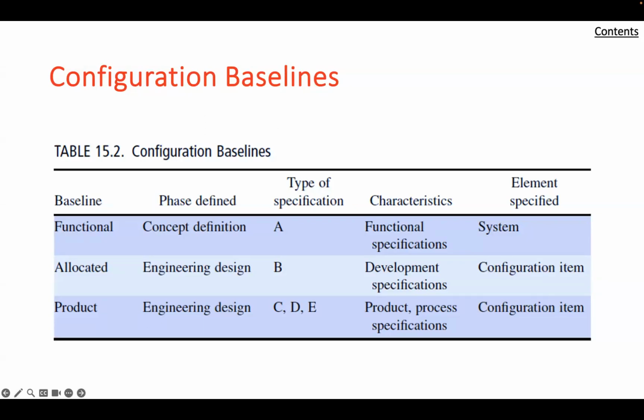The form of these documents is a function of the type of interface being documented, but during the engineering design phase, it must be sufficiently specific in terms of data and drawings to specify completely the interface conditions so that the individual component developers may design and test their products independently.